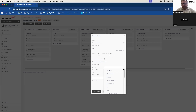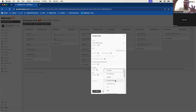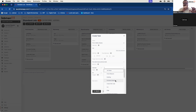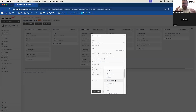A good example of concurrence: at the same time you are cutting board for your carcasses and doors, you can also be cutting the benchtops. Benchtops aren't reliant on that information — as long as they're well templated, they can be done at the same time. So rather than have my benchtops rely on cutting and edging to be ticked off, I can set them up to be happening at the same time. Once purchase ordering and CNC code is done, we can start cutting and producing benchtops concurrently, thus narrowing our flow and improving our efficiency.